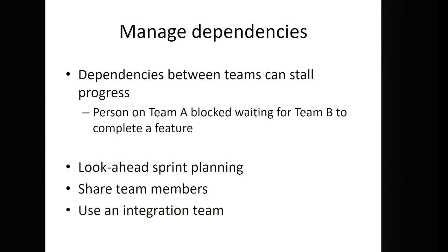Another thing that you might do is have an extra team whose job is to take work from the various other teams and integrate it together. The bits of the backlog they see, their sprint planning, will all be about taking the various bits that other teams have put together and fitting them into the product as a whole, and making sure it all works. And of course they will then have quite a good view on where the dependencies are.